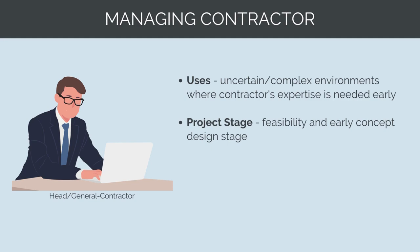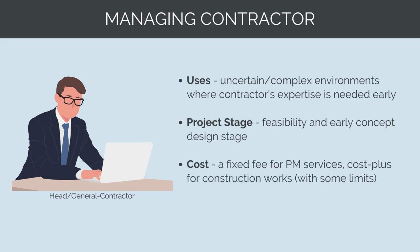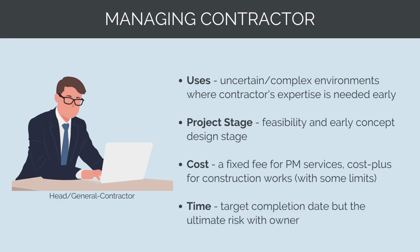Under this model, while the head contractor may give a fixed fee for the project management services, all construction works and management of trade contractors is paid at cost plus. Whether the contractor engages the subcontractors on behalf of the owner or the owner engages them directly, the ultimate cost risk sits with the owner. There may be some limitations to this, like a warranted maximum price. Similarly, while there will be a target completion date, the ultimate risk for completing the project on time will sit with the owner, and there will unlikely be liquidated damages applied.